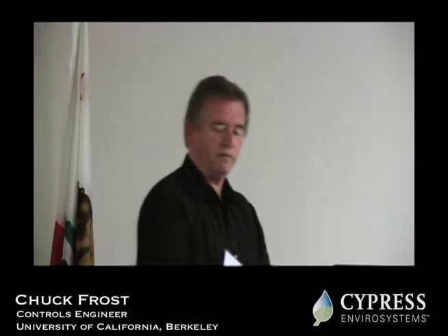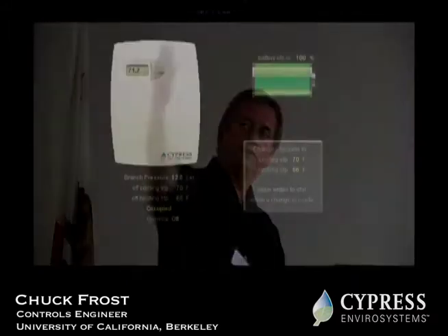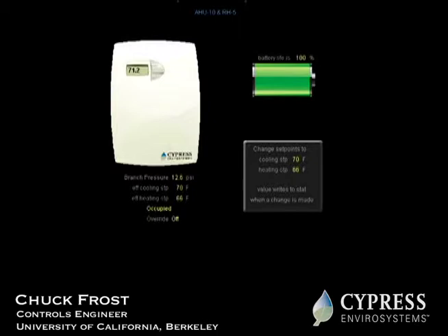And I see that a lot of times where you're looking at a nice graphic screen like this, and you're looking at an air handler, and somebody's got the data from the return fan mapped over to the graphic screen for the supply, so you've got the wrong data. Or the return air temperature in the building is actually where the supply air on the graphic should be, so they cross the points, and it adds confusion. So definitely commissioning is a plus.